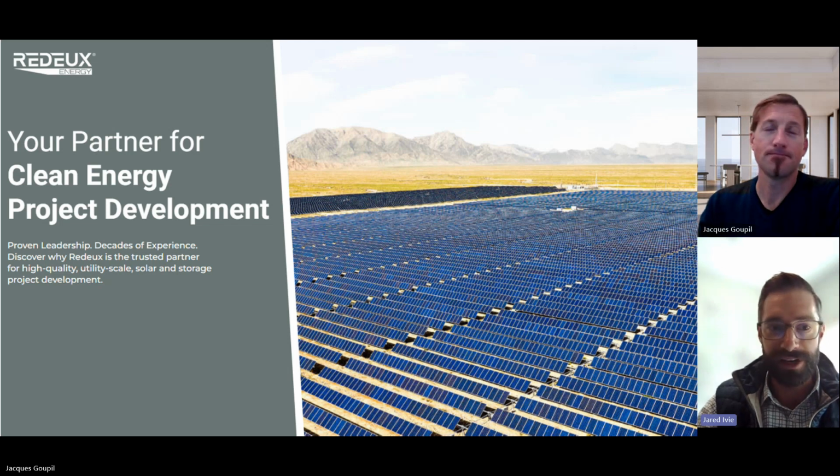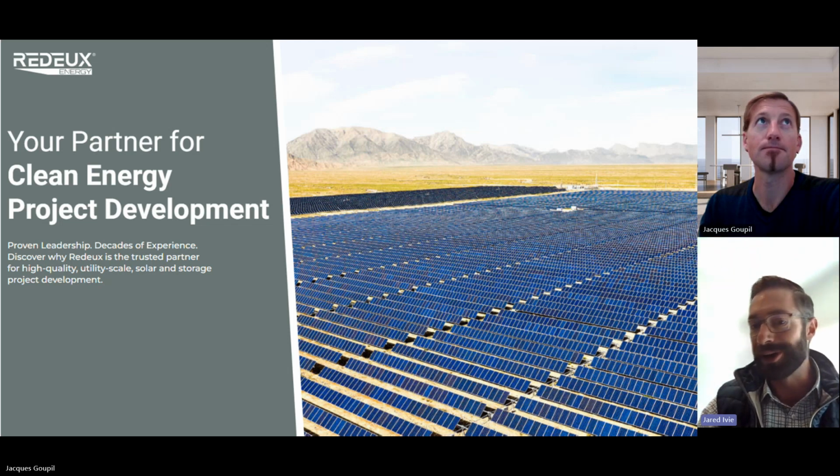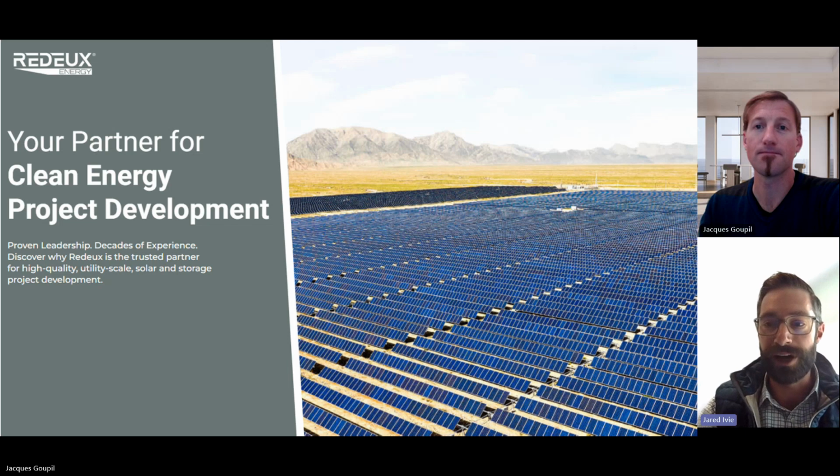And the solar farms we're looking at are 1,000 acre plus type solar farms, really large scale. But then after we get a good piece of land signed up, we work through a diligence effort where we de-risk, design, pretty typical waterfall approach, if you will, to get that project what we call shovel ready, where we will ultimately get it constructed and built and tied into the grid.